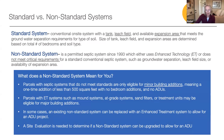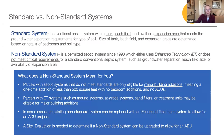Non-standard systems either use enhanced technology or do not meet the requirements of a standard conventional system, but function adequately for the existing usage. So what does it mean if you have a non-standard system? Parcels with systems that do not meet current code, whether standard or non-standard, are not eligible to build an ADU, but may do a one-time addition of up to 500 square feet with no additional bedrooms. Parcels with enhanced technology systems may be eligible to build an ADU with an upgrade to account for the additional waste, and properties with non-standard systems may be able to upgrade to include an enhanced technology system to allow for an ADU.